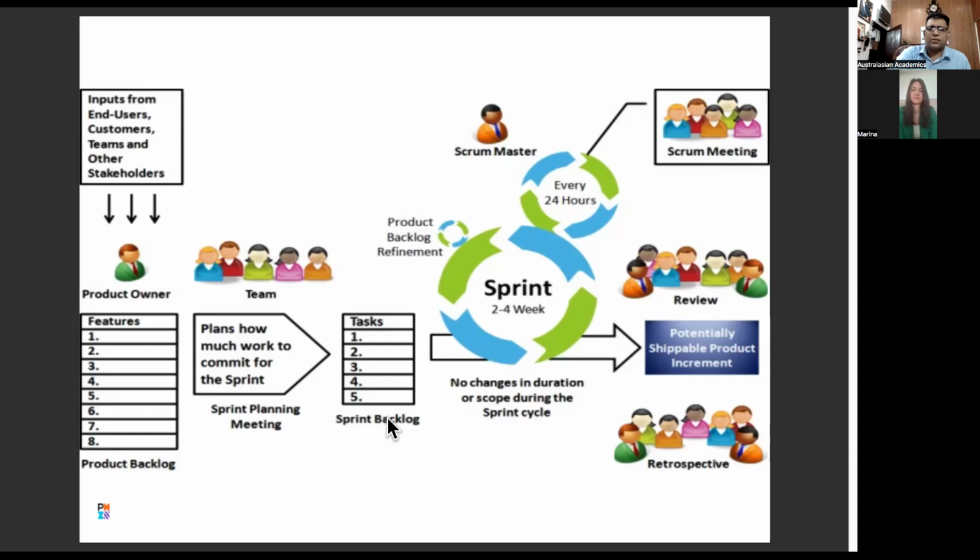But the PMP exam is not going to be huge on Scrum. So again, at the bottom, you've got a sprint review, right? And then you've got a sprint retrospective. The piece of work we delivered, one level of the building, one floor, right? We review what we've done. And then we do the retrospective each and every sprint at the completion of it. It's more like a lesson learned, but it's named differently. So you've got a sprint review meeting and a sprint retrospective meeting.